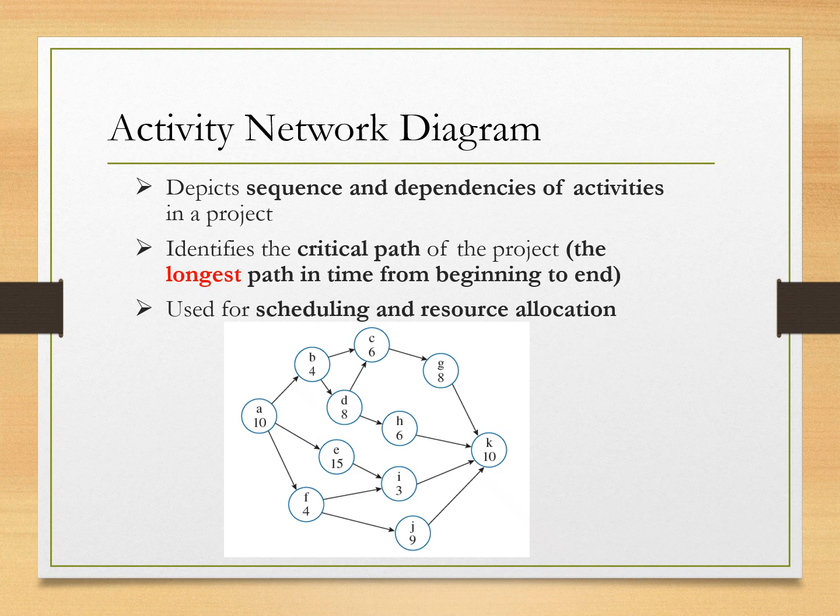The real power of this diagram is to identify the critical path, which is the longest chain of dependent tasks that determine the project's total duration. Any delay in the critical path will delay the whole project. By visualizing those connections, we can schedule work effectively, allocate resources wisely, and keep our project on track from start to finish.